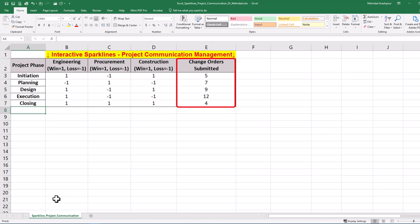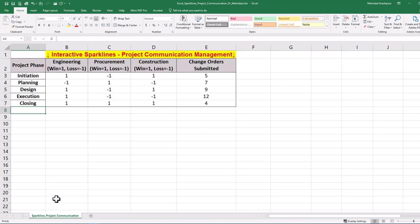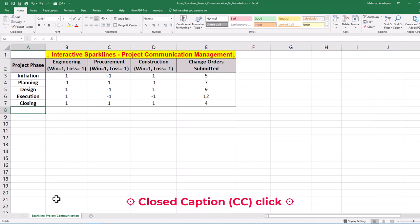During each phase, multiple change order requests or CORs are submitted. Our project manager evaluates communication between the engineering, procurement, and construction teams, where effective communication is a win and receives a score of 1. Loss is ineffective communication with a score of minus 1, where our client rejects change order requests or we have delayed and costly implementation on site.